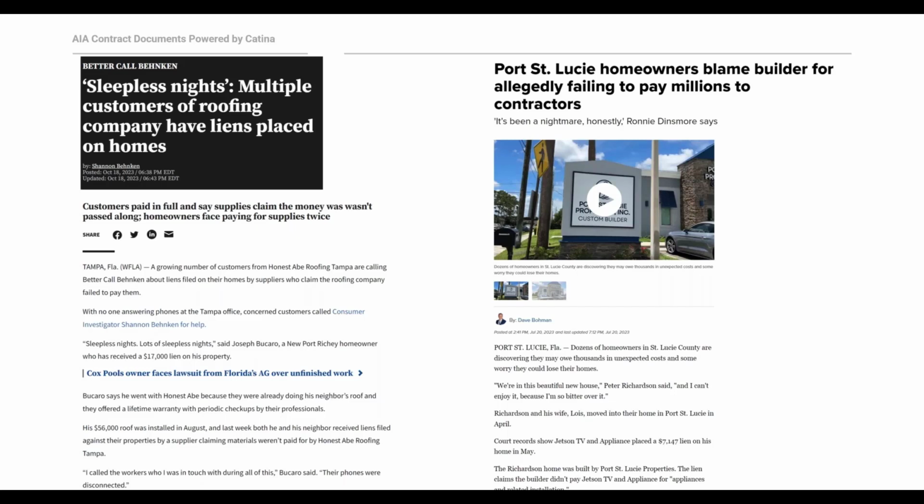Sarah, do you have any thoughts or examples from your own experience? Yeah, those are really good points, Mike. When I read through these articles, what came to mind is how certain jurisdictions require contractors to submit lien waivers to homeowners when they're performing work on residential projects in exchange for payment. And the law requires contractors to submit the waiver regardless of whether the homeowner requests it, regardless of whether the homeowner even knows what it is. So it sounds like that would have been super useful in these jurisdictions. And it's just yet another reason why we're going to keep emphasizing how important it is to be aware of the jurisdictional requirements in the area of your project.